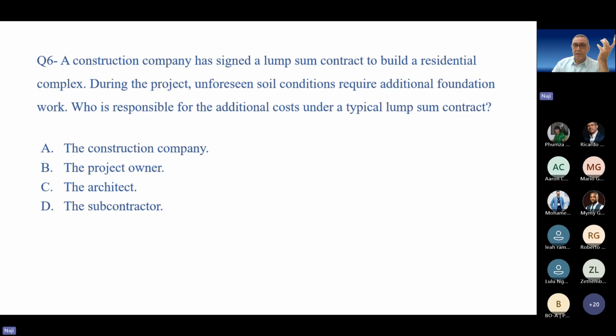I get your question, and it's a good one. Well, you mentioned force majeure. I asked this a few minutes ago. If I ask what is force majeure, I would get 10 different answers. But really, force majeure is not related to the soil being different from the excavated soil. It is maybe war, it's maybe a hurricane. It's mostly about big, dangerous things.